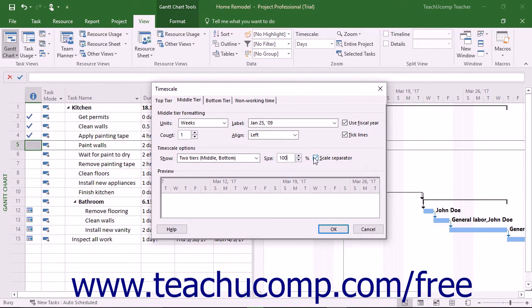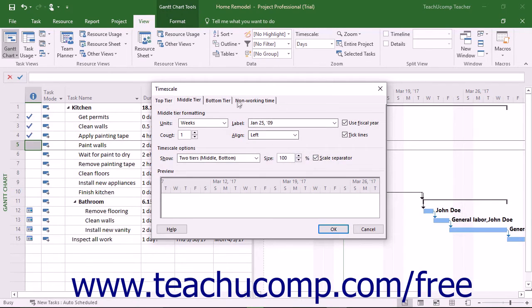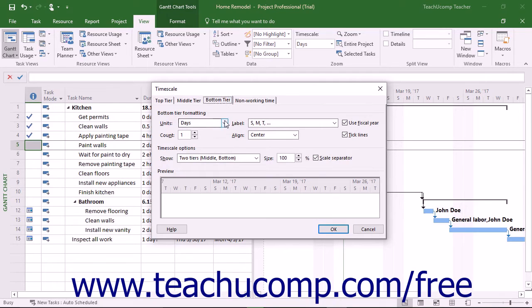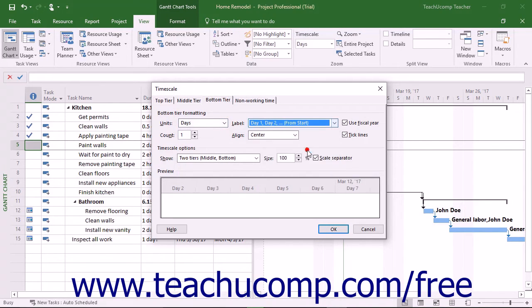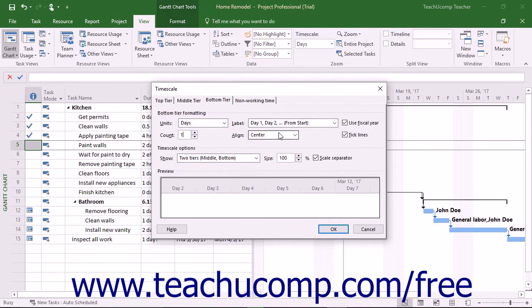Once you've decided which tiers to display, you can then click the name of the tab that corresponds to the tier you wish to format. You can then use the Units, Label, Count, and Align drop-downs that appear at the top of the tab to apply your desired options to that tier in the time scale.